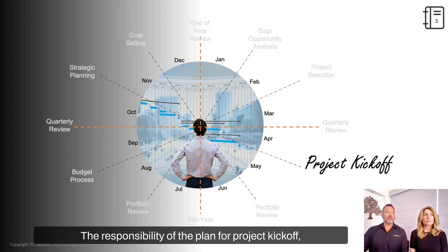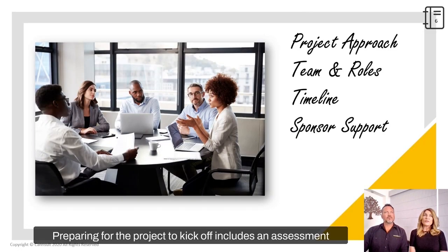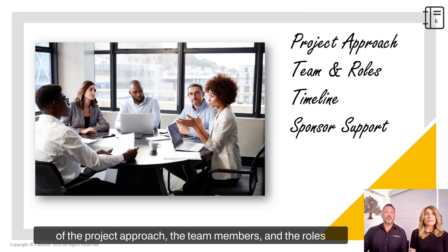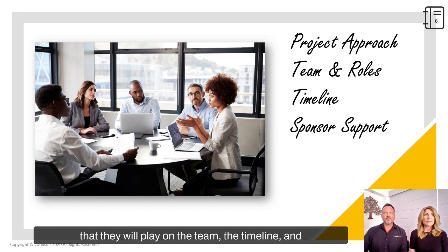The responsibility of the plan for project kickoff, which is effectively the final step in project selection, belongs to the project sponsors. They will coordinate the timeline of the projects, the meetings where the project is officially kicked off, and they will develop the plan for ongoing tracking and supporting of the projects. Preparing for the projects to kick off includes an assessment of the project approach, the team members and the roles that they will play on the team, the timeline, and the type of sponsor support that will be required.